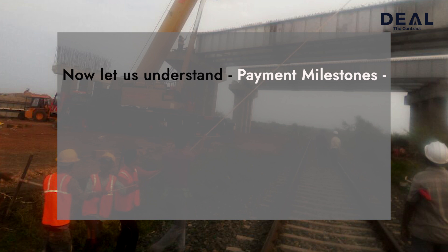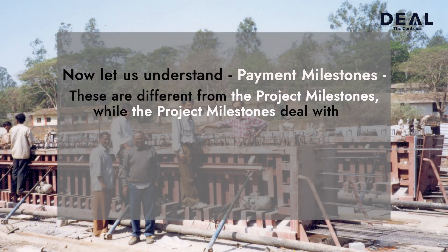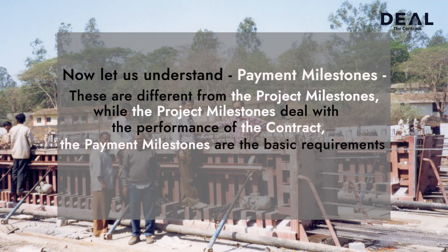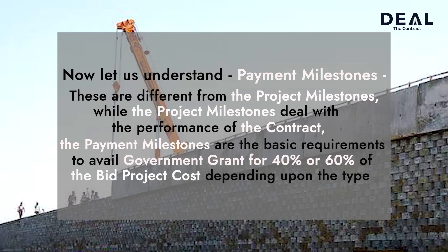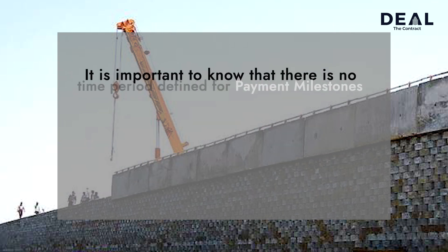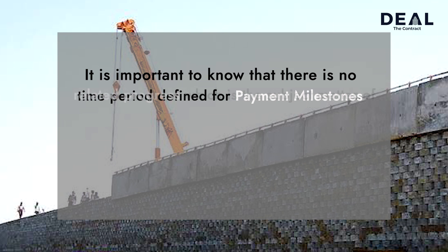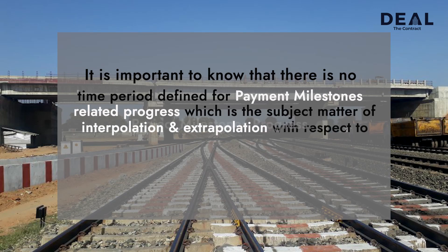Now let us understand payment milestones. These are different from project milestones. While project milestones deal with the performance of the contract, payment milestones are the basic requirement to avail government grant — 40% or 60% of the bid project cost depending upon whether it is a state or central government project. It is important to know that there is no time period defined for payment milestone-related progress, which is the subject matter of interpolation and extrapolation with respect to project milestone progress.